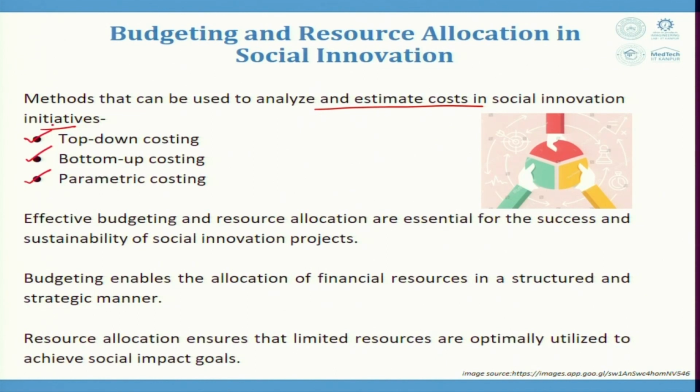Each component of the cost is then calculated and accumulated and put together to have the total product cost, that is top down. Bottom up approach, this is where the cost of the individual components is first calculated, then these are summed together to make the total cost. In the top down case, the product is divided to components. In the second case, we have components to product.